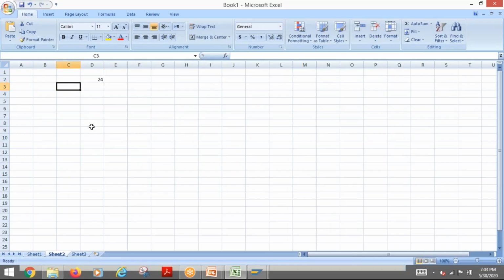So let's say how we are going to do the naming. For example, first I need a digit, so the digit I will put, say, 2 digits. Then I need a separator, right? So the separator will be 1. Then the numbering for the project will be, let's say, 5 digits. So this itself became 8, right?